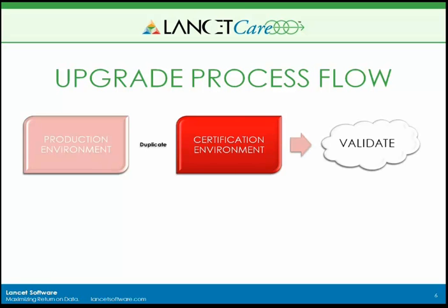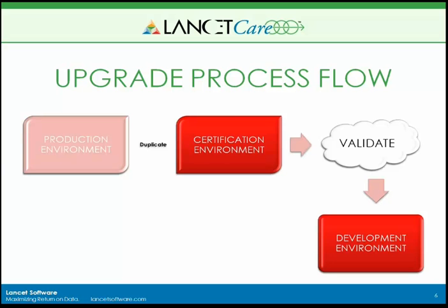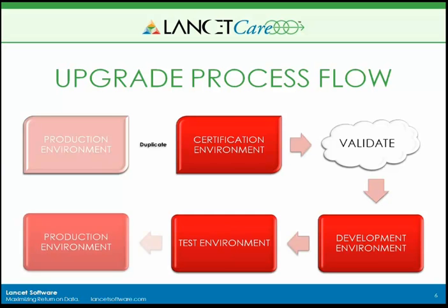So you do your basic technical validation in that environment, and then open that up to some of your project teams or anybody who's involved in validations, and they can do their in-depth validation without impacting your existing environments at all. So once you feel comfortable with the upgrade and you've validated all the steps that you want to validate, you can then go on to your existing environment. So the normal process flow would be to upgrade development and test and production.